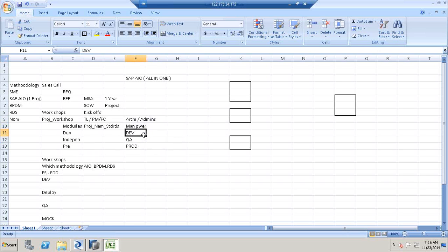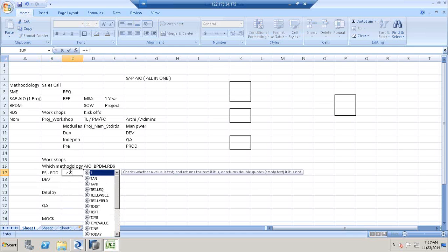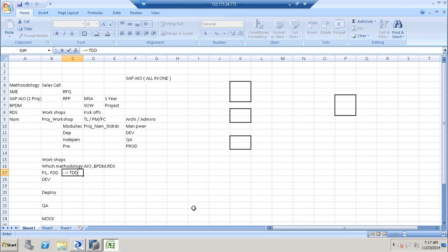So they decide on all these things, and now we have these people started, and they will be working on setting up the dev environment first, and they will create users, authentication, central repositories, and everything, and go and configure that. And while these people work on that activity, the functional consultants from both our company end and the customer end will go and create a functional design document. And looking at the functional design documents, the leads or the senior consultants will go and create a technical design document. We call that TDD, or a technical specification.